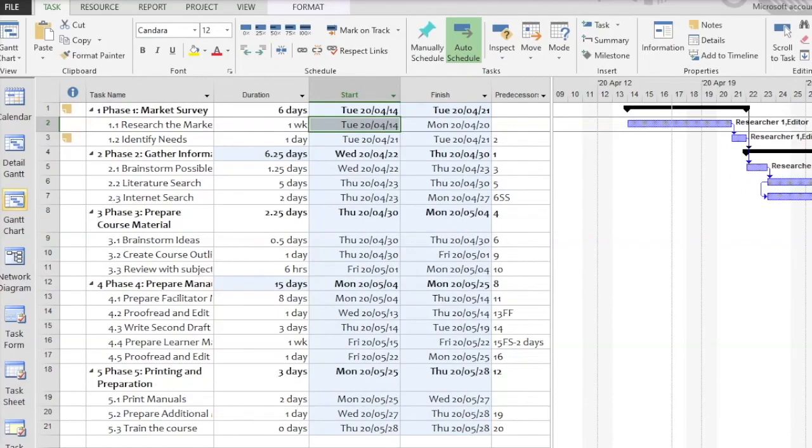In this lesson we're going to learn how to track a project. As you can see, this project started 3 days ago. I can work that out from comparing the start date of the project with the dashed line that is out of context. Not the normal dashed line to indicate the middle of a weekend, but a dashed line in the middle of a week that indicates the beginning of a project. In Project 2010 it is red, and in Project 2013 and following it is green. So that task started 3 days ago and we need to track that project.